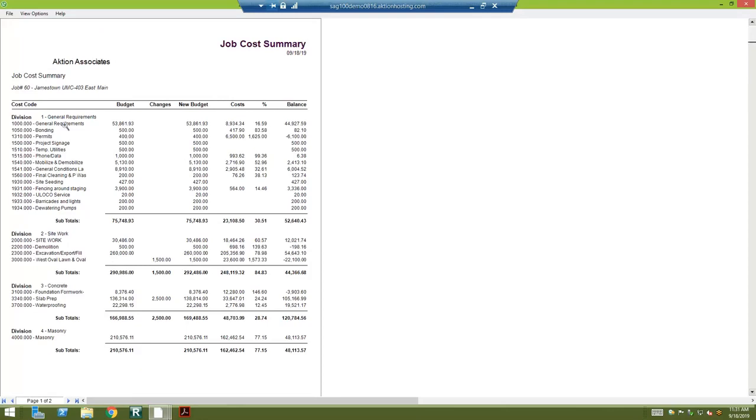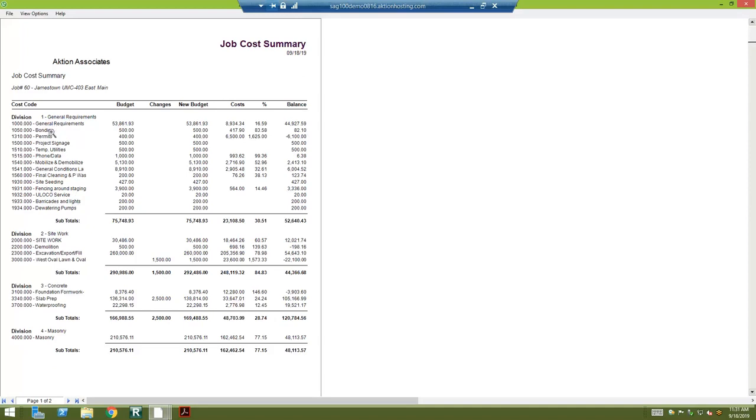Our job cost summary is going to give you basically budget to actual. Your cost codes are going to be on the left. That's how we budgeted the job. This looks like it has about 15 of them, but whatever that number is, those are going to be here.